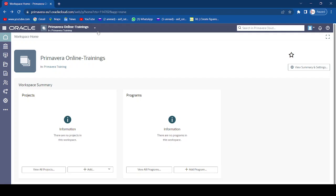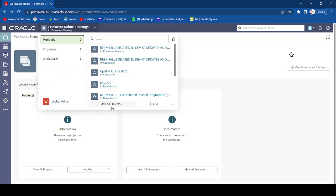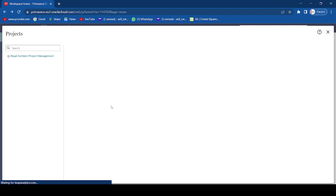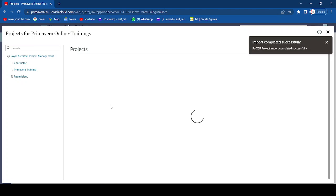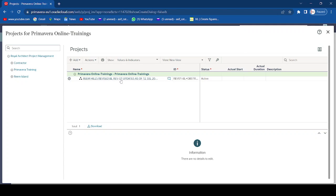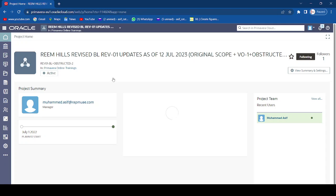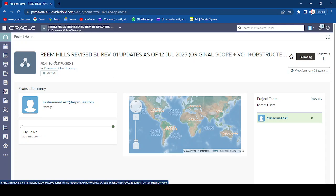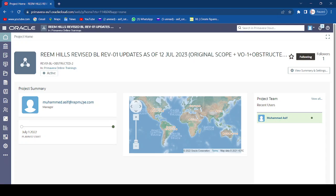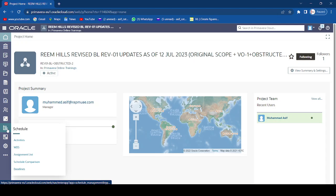The program has now been imported. Open the object selector and select 'View All Projects.' You can now see the imported project — for example, 'Primavera Online Training.' Select the program to open it. You will see it is the revised update as of 12 July, showing the project start and finish. The percentage completion may not be showing yet — we will address that shortly by going to Activities.